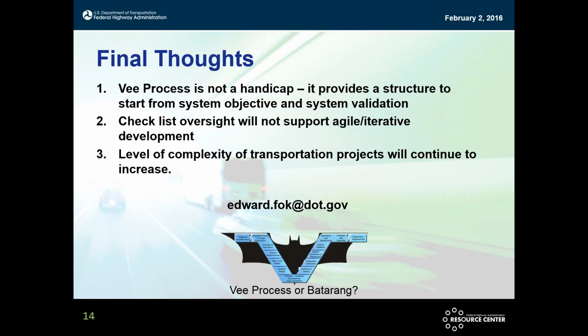So some of the requirements, I guess what I'm trying to say, every backlog item includes some aspect of meeting that requirement within it as part of the details of what the definition of done is. Prioritize. That's actually part of the hard part about defining what your minimum viable product is that you're going to demonstrate for each release or iteration. Sometimes you have to figure out that minimum viable product to build, and so that ties into how you prioritize those requirements.